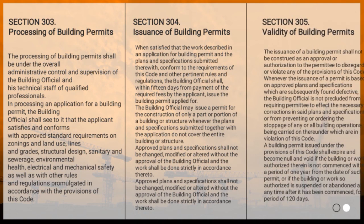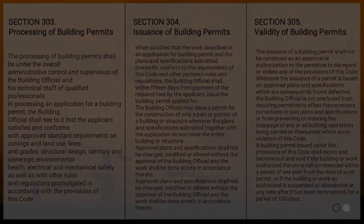The building official may issue a permit for the construction of only a part or portion of a building whenever the plans and specifications submitted do not cover the entire building or structure. Approved plans and specifications shall not be changed, modified, or altered without the approval of the building official, and the work shall be done strictly in accordance thereto. Section 305, Validity of Building Permits: the issuance of a building permit shall not be construed as an approval or authorization to the permittee to disregard or violate any provisions of this Code. A building permit shall expire and become null and void if the building or work authorized therein is not commenced within a period of one year from the date of such permit, or if the building or work is suspended or abandoned for a period of 120 days.